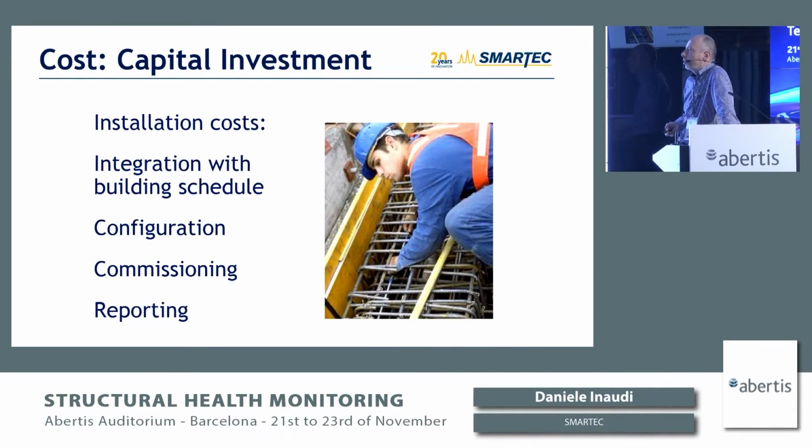Then you have the installation cost. Can be quite different if it's an existing structure or a new one. In particular, when you are building a new structure, you need to make sure that the installation of the monitoring system is compatible with the schedule of the construction site itself. Then you have configuration, commissioning, and reporting.